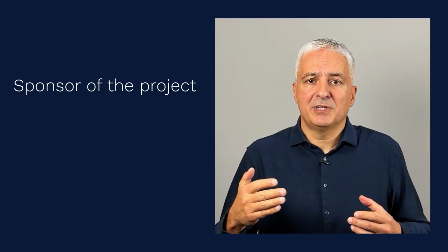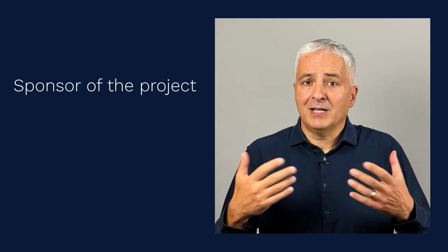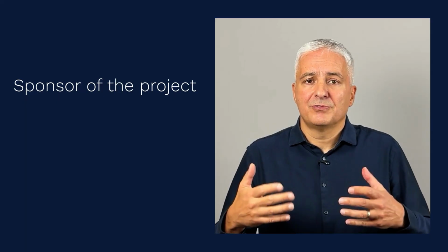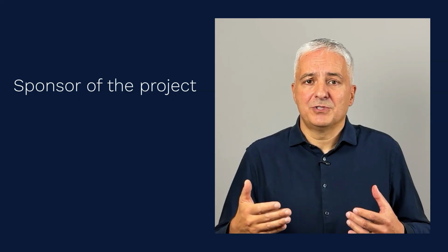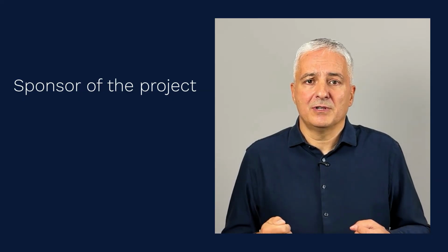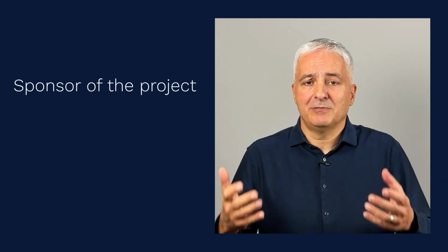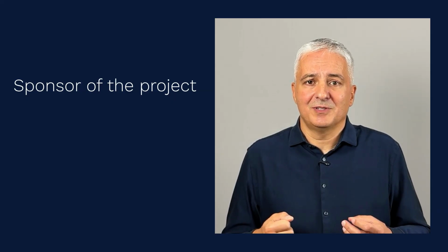And this sponsor means a member of the senior management who is not actively participating in the project, but to whom you can turn if there is a problem with the project, so that that person can resolve this problem quickly and efficiently because of his or her authority. And this person really needs to be interested in the positive outcome of the project. So this is basically how this person should be chosen from the senior management.